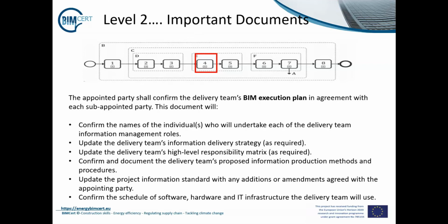The pre-BIM execution plan usually forms part of the tender. The BIM execution plan is usually the response to the tender from the contractor with all the required details within the pre-BIM execution plan in order for this to be successfully executed.